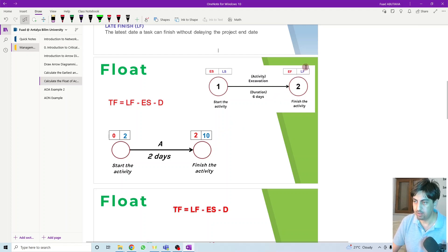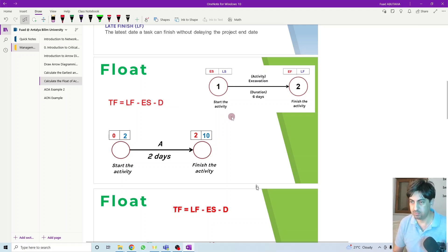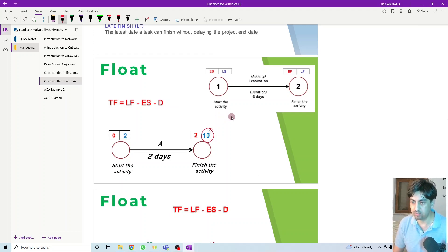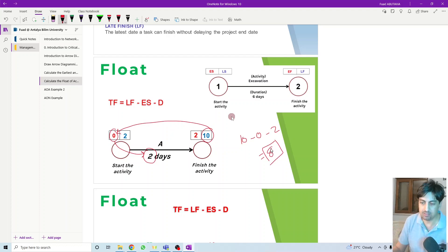The float can be calculated by: Late Finish minus Early Start minus the Duration. So the float equals Late Finish minus Early Start minus Duration. For activity A: late finish is 10, minus early start 0, minus duration 2 days, which equals 8. So we have 8 days of flexibility for activity A.